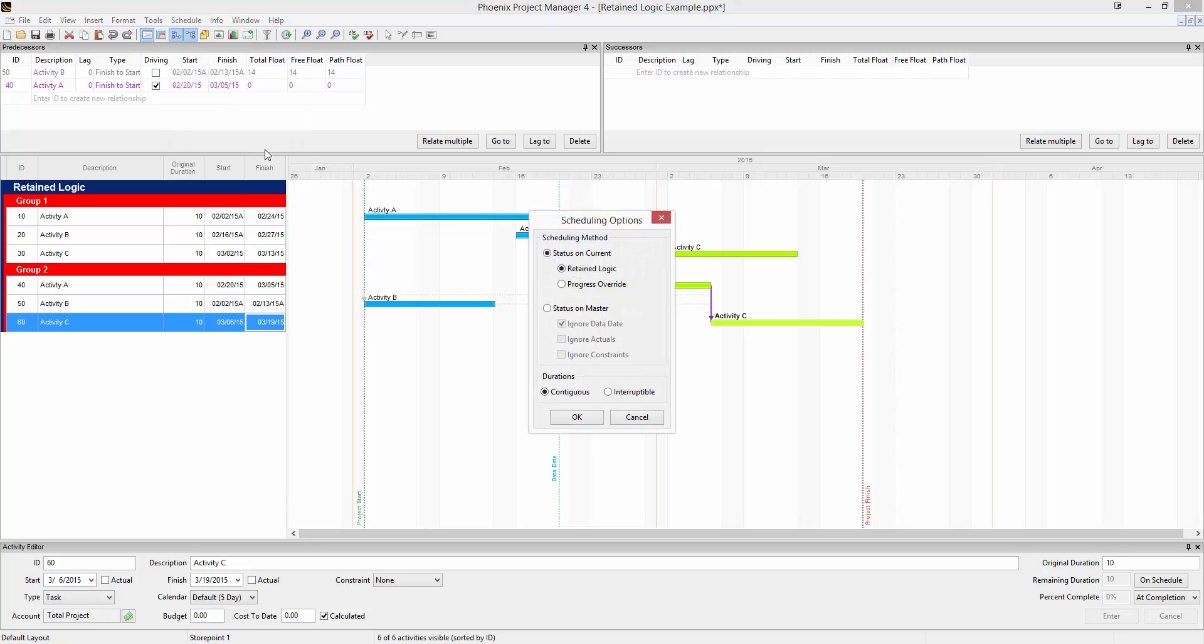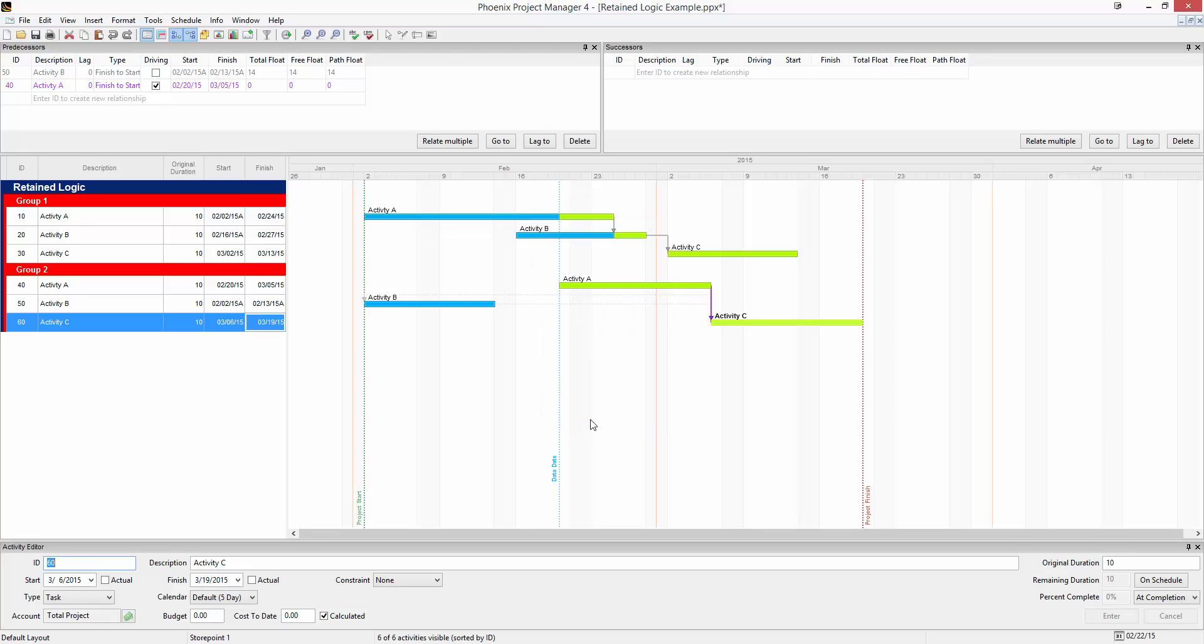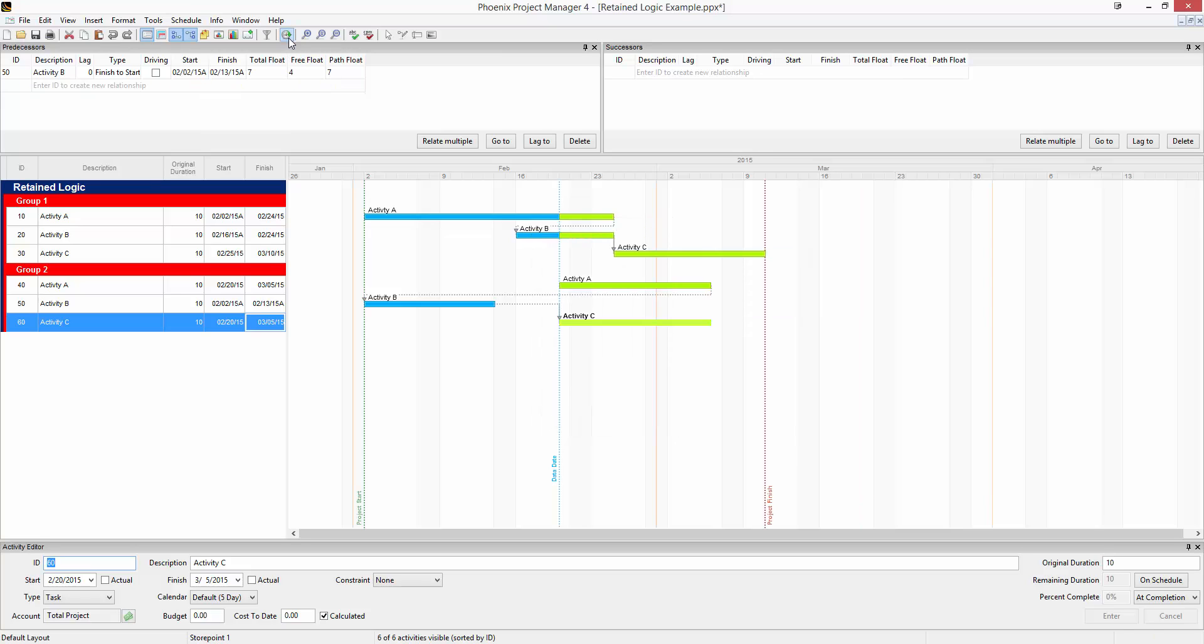And then hit the schedule button. Progress override will essentially no longer respect those relationships between the activities that happened out of sequence.